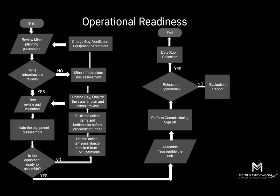I just put together a chart to go through commissioning and operations. We're heavily involved in some implementations right now with clients on a global basis, in Latin America and also in North America, hence the reason I'm in Florida. It's a process you can go through: we gave the PO to the OEM, so what's the design criteria? What are the specs at the mine? Does it meet all the requirements? What are the drawings? What does it look like? What's the battery chemistry and so on?